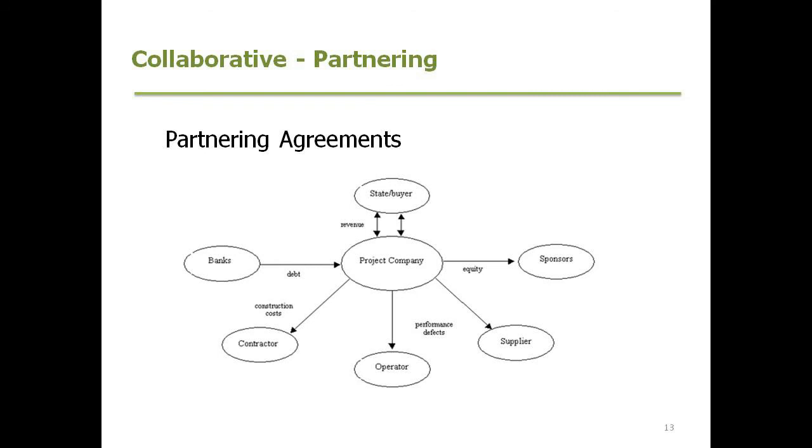I mean innovation in several different ways. It's not just the building design, the fabric and speed of delivery, but also the financial arrangement and the commitment and the involvement of the community as well. There's a real strategic focus, win-win, with this style of agreement, and the partner charter that's established between the parties establishes a good working relationship, while legal commitments between the parties are established via a traditional contract model, and those are recognised.